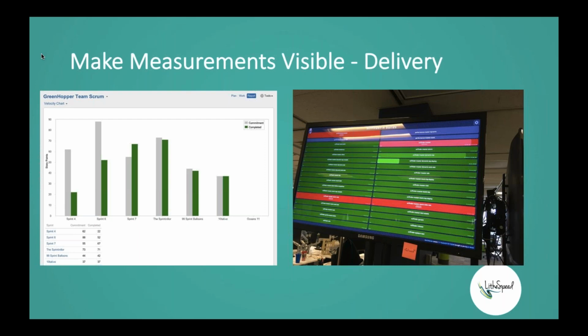And that's the situation I've got on the left-hand side here, where one sprint we deliver 5 points, the next sprint we deliver 20 points, the next sprint we deliver no points, the next sprint we deliver 15 points. When are we going to be done with this effort? There's no idea, right? There's no predictability there. So if that's an issue with some of your teams, then you might measure that.